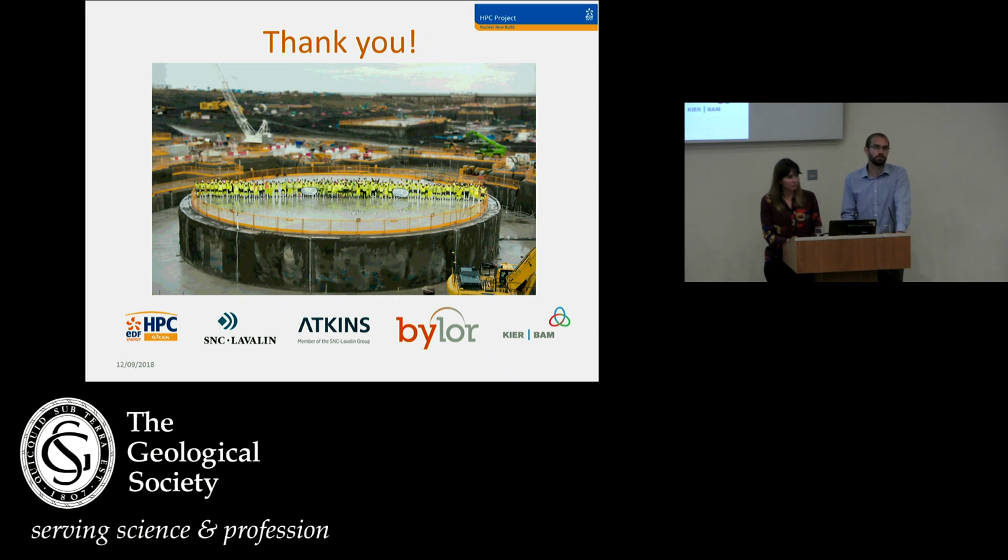It perhaps wasn't as easy to provide value engineering as on some other projects, but for a number of the smaller buildings, some of the ancillary structures, we've been able to get involved in the design development from an earlier stage, from a concept stage, not just brought in as the level 3 detailed designer, which we were for the unclassified buildings and the classified buildings. We had more scope to conduct phases of value engineering and look at potential benefits by either combining buildings or reducing their size and scope. And I guess recently that's become more evident for me as the projects look to reduce costs going forward, and it's become a more important issue than it was perhaps at the beginning, which I think is fair to say. But yeah, it's definitely been taken on board and not just parked.